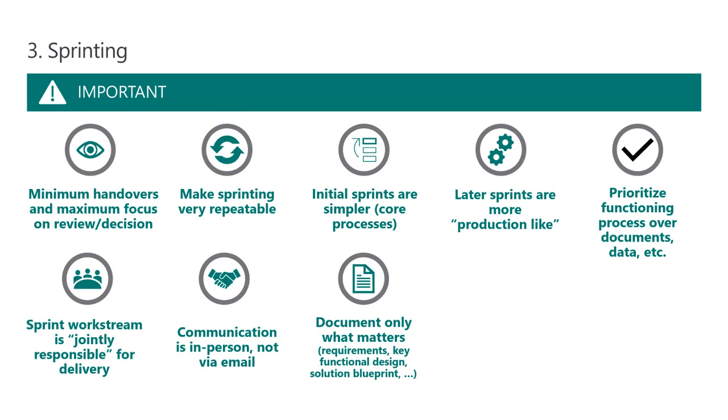Again, it's important that you minimize the amount of handovers. Every time you have a document handover, which requires somebody to go away, review, comment, approve, hand back to you, then somebody else hands it to another team, that is dead time, right? You need to minimize that so the maximum focus is on a review in the room. So if you need to get a design document reviewed, do it in a workshop environment in the room. Talk it through, right? Don't wait 5 days for it to go around a cycle. Make sure all of that can happen within the sprint.